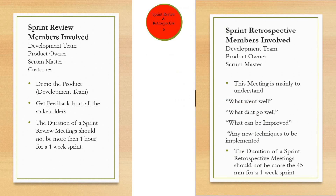The next stage is the sprint review and sprint retrospective. In the sprint review meeting, members involved are the development team, the product owner, the scrum master, and in some cases the customer. The main features of this meeting are: the development team demos the product to all stakeholders involved; and feedback is gathered from all stakeholders regarding the demo. The duration should not be more than one hour for a one-week sprint, or three hours for a three-week sprint.